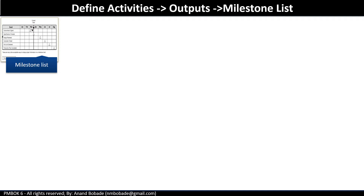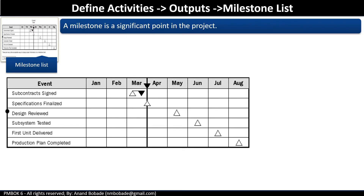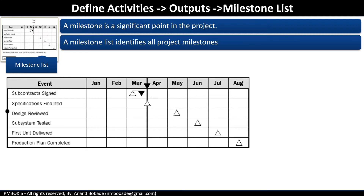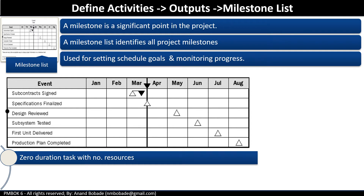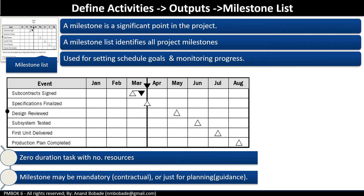Milestone list: a milestone is a significant point or event in a project. A milestone list identifies all project milestones and is used for setting schedule goals and monitoring project progress. Remember, a milestone is considered to have zero duration because it represents a point or event in the project and is not an activity to be executed. Milestones may be mandatory — for example, a contractual milestone — or they can be planning milestones used for guidance purposes.